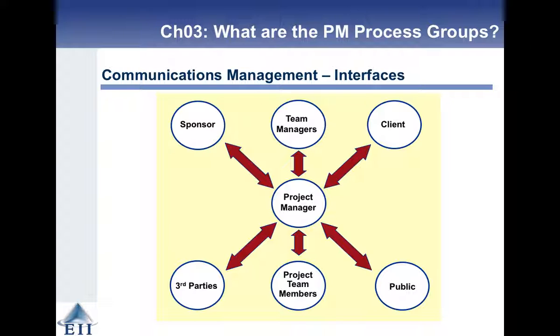If you don't, here you've got 7 different stakeholders, and for 7 different stakeholders you've got n times n minus 1 on 2, so 7 times 6 divided by 2, so you've got 21 different connections that could happen between these 7 things. Whereas if you try and centralize things, then you've only got 6 connections that you need to worry about. It's much easier to manage than 21.